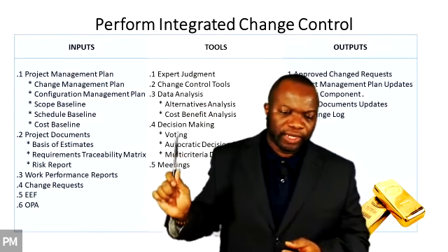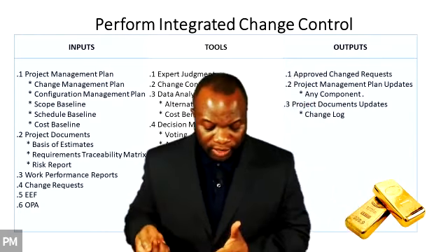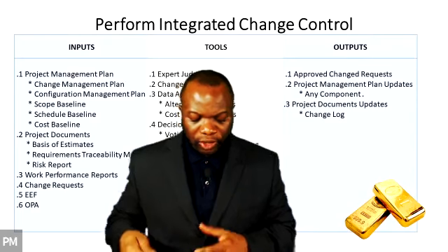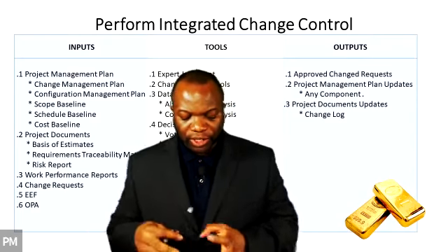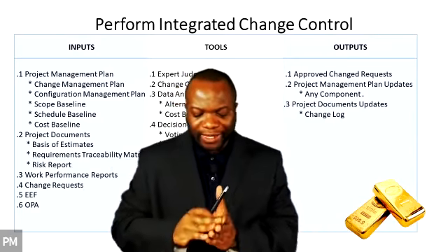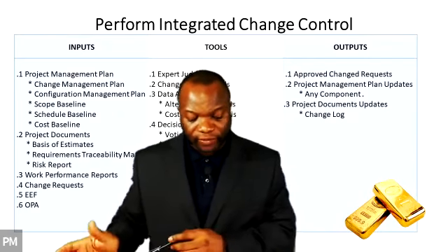And then we've got these, voting. So you could vote in the change control board using unanimity. Unanimity means everyone must agree. Majority means the largest, or no, I beg your pardon. Majority means at least over 50 must decide, greater than 50%.